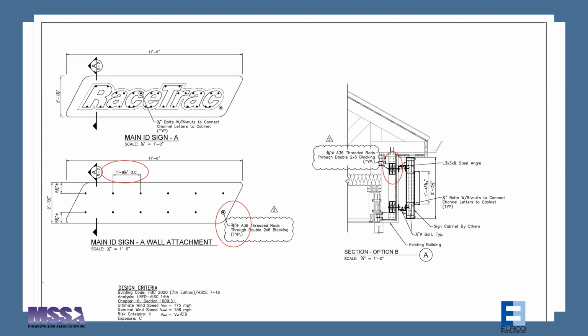This actual site came about because our client had a local person do the install. They did it incorrectly. The inspector actually came out to the site, and I know that doesn't happen all the time, but they started looking at it and said, you've installed it different than the engineering. We're not going to approve this unless you can get engineering to demonstrate that what you did actually works. So we had to scramble and do that, and everything checked out fine. But at the last minute, it was holding up their permit approval, and the ultimate client, the end user, was not happy about that.